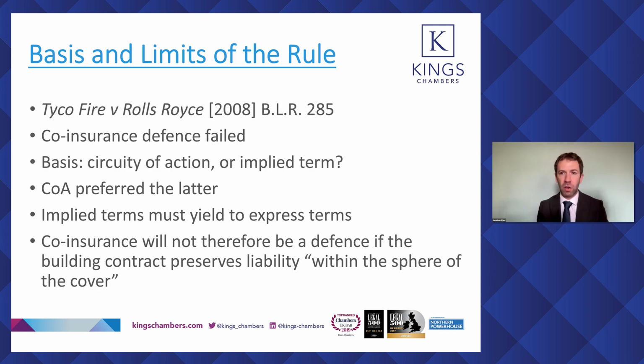It was the question of whether contractors with a small c actually covered Tyco, who was the main contractor. So the resolution of that issue was that Tyco wasn't covered, wasn't co-assured, and so the defence failed on that point alone. But the Court of Appeal went on to consider obiter what the position would be if the parties had been co-insured under the same policy. So the Court of Appeal considered the basis of the principle and said that it was actually found generally to be found in implied terms and or the true construction of the contract rather than a notion of circuity of action, which had been deployed in earlier cases.